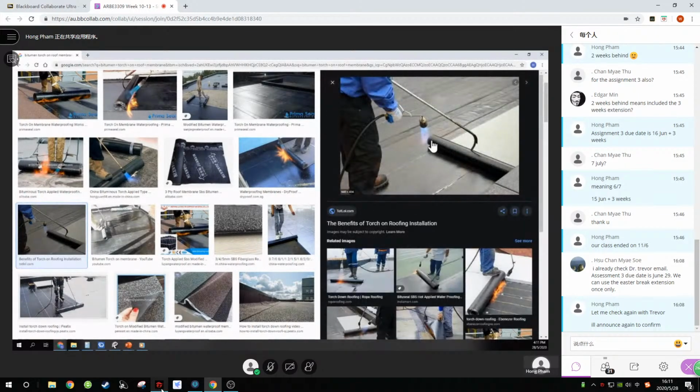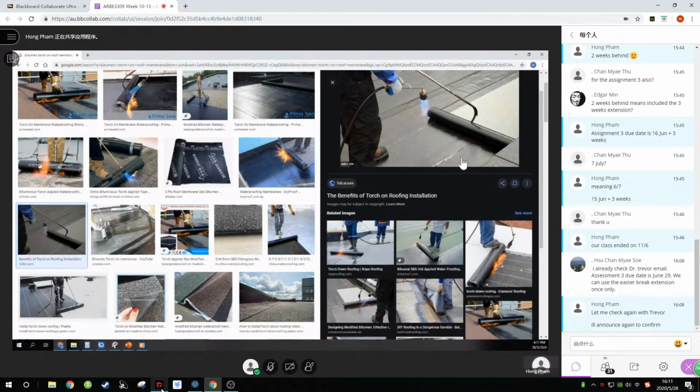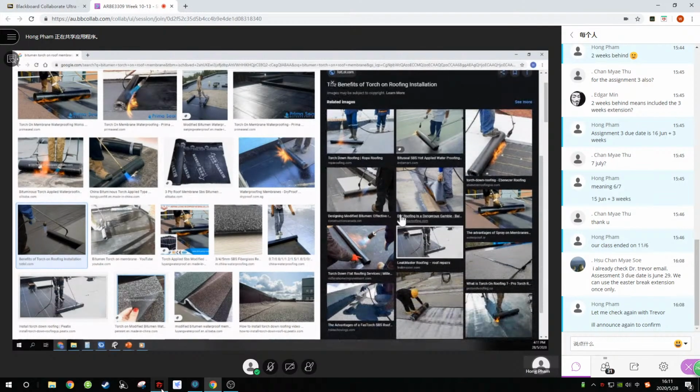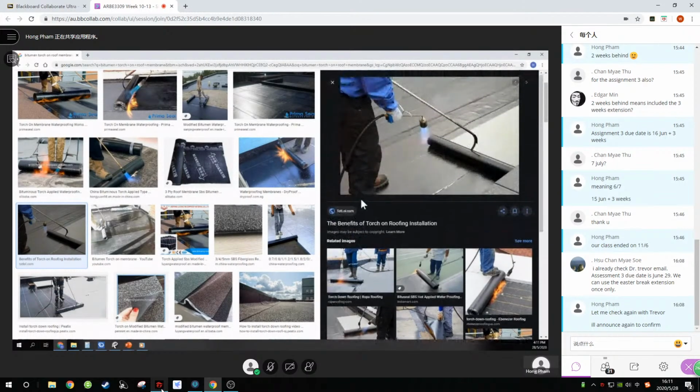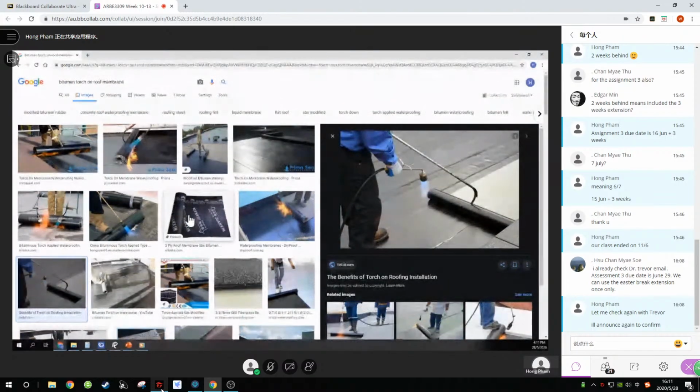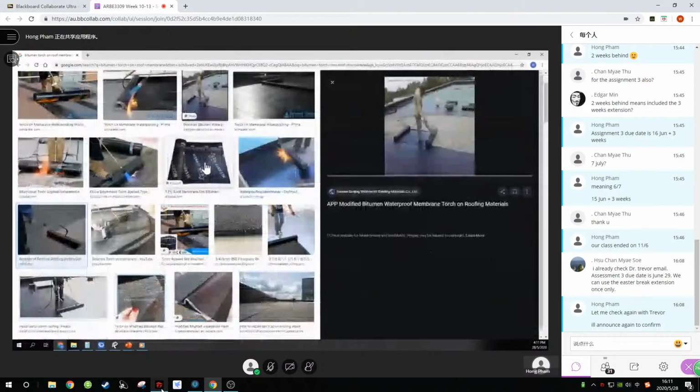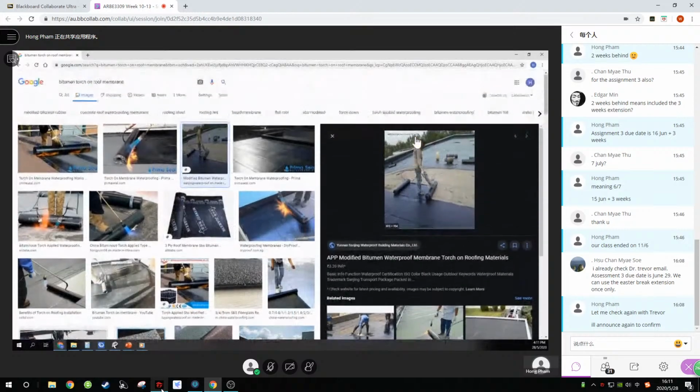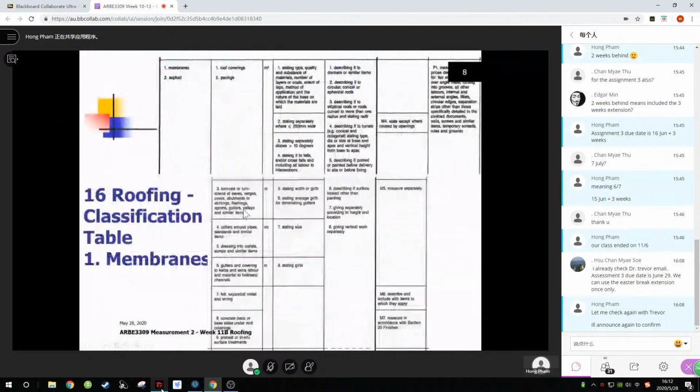You've got turn-ups and turn-downs at eaves, which I spoke about. They have to be measured in lineal metres because the guys have to come along and do it. Penetrations, measure the collars. Remember we talked about flashings, there's upstand and apron flashings. When you measure a flashing for a pipe, like a vent pipe that comes through a roof sheet, you've got an upstand flashing and an over flashing you have to measure. So you've got 3 items to measure for a pipe penetration through a roof.